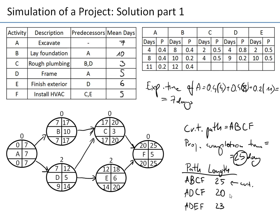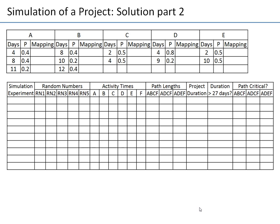When we simulate, the same three paths exist — the network structure and predecessors don't change. What changes is the duration of each activity, which is random. Each path will have a new length depending on random activity times, and a different path might become critical. The project duration equals the length of the longest path.